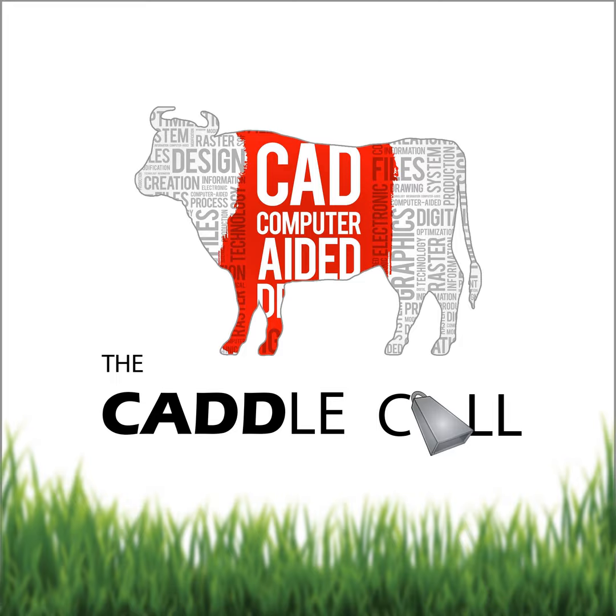So, one of the biggest benefits that I see on working with CAD files is that a good chunk of your work may already be done for you, right? Like we were saying earlier, on a lot of jobs, the architect or the engineer may have done the initial design. They've done a kind of rough layout of your system. And it's usually enough to get approvals, etc., so they can get the job going and bid. But it is almost never good enough to actually build from or even to bid from.